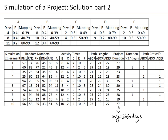For the probability of exceeding 27 days, I look at the exceedance column: it happened four times out of ten experiments, giving a 40% probability. If we're promising 27 days or less to our customer, we should be careful — there's a quite significant chance of exceeding that deadline.